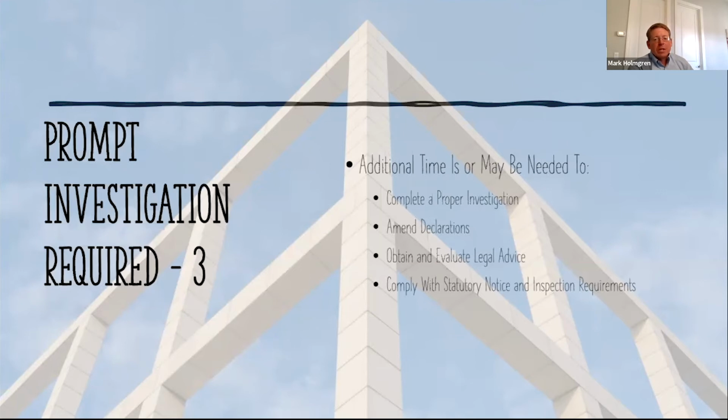Because if you wait until the building's 8 years old and you send your demand letter, guess what? The statute of limitations is going to run. And if you run out and file an arbitration, it's premature because you didn't follow all the steps in the alternative dispute resolution provision in the CC&Rs. So we have these time limits, but they don't even give you the full story because you have to comply with all the shenanigans in the CC&Rs. You have to jump through all those hoops before you can even file the action to stop the clock from running. So again, just giving you more reasons to get lawyers involved in these things.